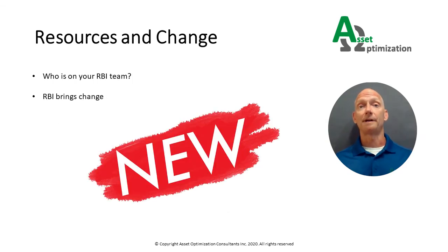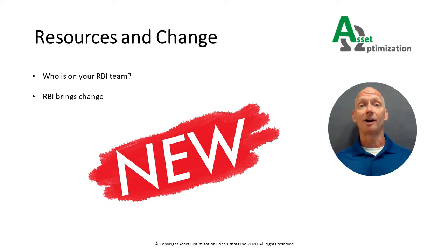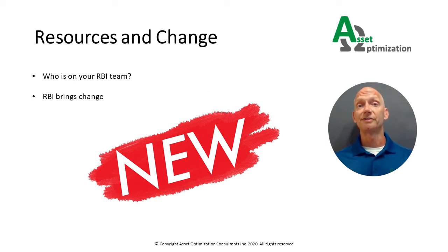You can't start your RBI project until you've identified your RBI team. In order to build ownership and sustainability for the RBI program, ideally the RBI team members should be selected from the user-owner facility. However, if skilled resources are not available, you will need to use contractors.